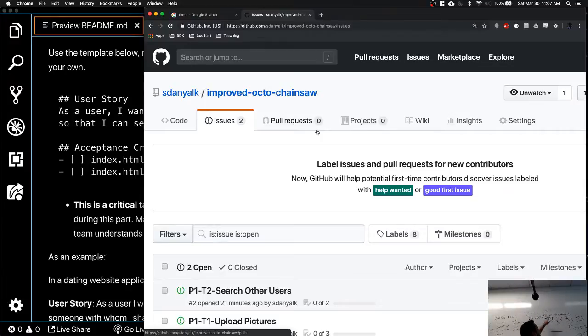But if at the end of the second day I'm not successful, it's not a failure. It's just like, we don't have time. This is the budget and this is the time that has been given to you, all right? You have to accomplish this task in this budget and this time. At this point, the team will pivot, either continue, again, it's a team decision, or the team says, hey, let's find another music API that's maybe relatively easier to use. Or maybe we switch around and try to find something different that will come in our MVP goals.